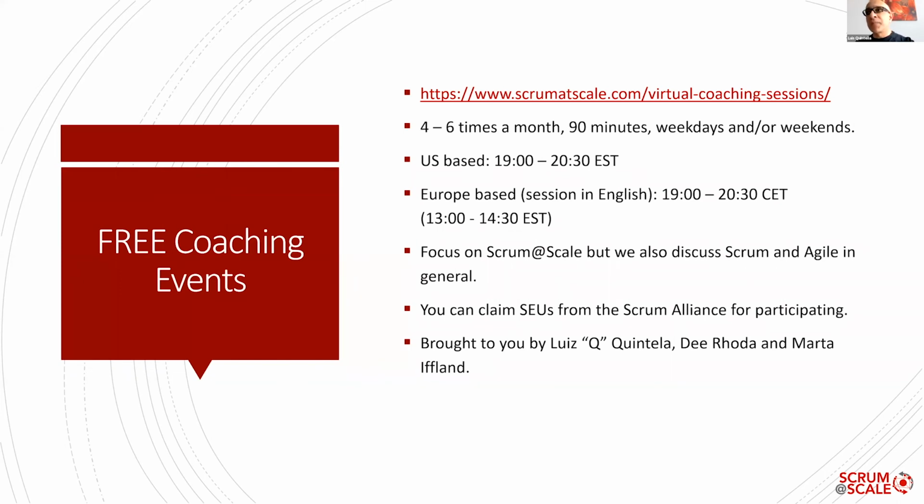One is how many impediments you found because you didn't have executive support or HR support, or for instance, if the people who do deployment are not part of your development, how many hours, days, or months until you get those things to happen. So there are several metrics that you can document, but usually the decision delay is the most important one. How much difficulty you are having with your transformation as far as getting things done, getting budgets approved, getting a product organization to exist and actually be empowered.